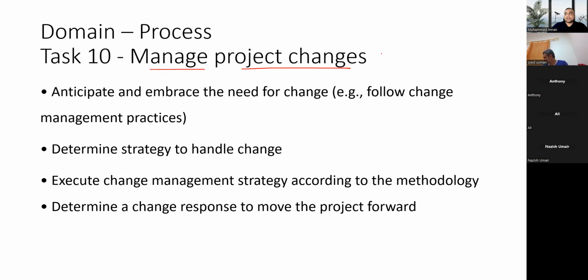project changes. In predictive project management, changes will be coming to you as a project manager. Those who have forgotten, let me repeat it. What was the process for change? The process for change was that any stakeholder can submit the change request. Whenever they ask for the change, you will provide them the artifact called the change request form. Once they fill in the change request form, they will give it to you. You will enlist them in the document called the change log.